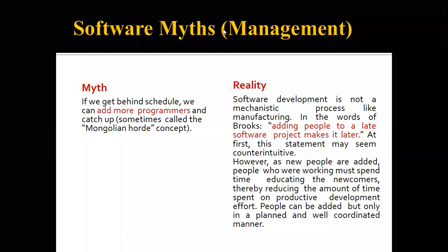The next myth: if we get behind schedule, we can add more programmers and catch up, sometimes called the Mongolian horde concept. Whenever an end user comes to the developer saying this particular software needs to be developed, he's going to give you a time frame. A time frame means that within this specified time, your software should be completed, because they want to launch the software or something. So this myth is that if you're behind schedule, that is, if you're not able to complete it within the specified time frame, you can just add more programmers and the work will be done.